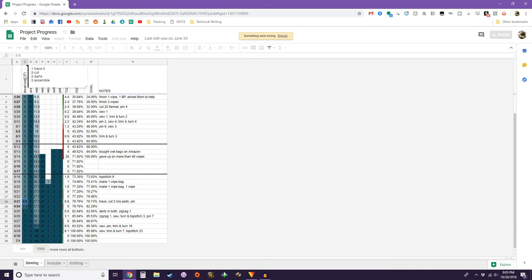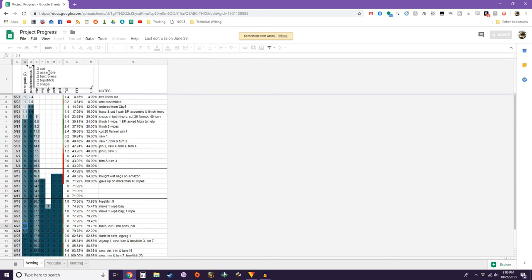I took notes about what I did every single day to help keep track. You'll see entries like '5.8 breast pads' — that means 0.1 was to trace it, 0.3 to cut it, 0.3 to sew the darts, 0.3 to assemble, because each item has multiple steps. So I could trace out a bunch in one night, or cut all the wipes in one night — that would count as a percentage of the total project rather than zero completed items.